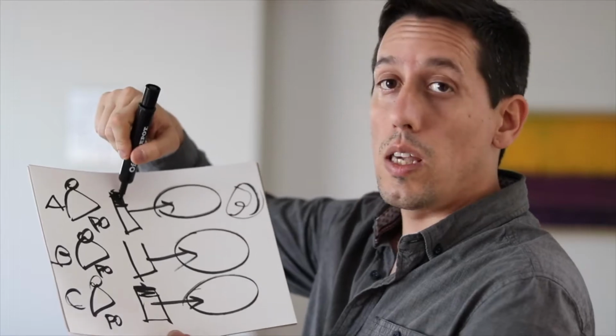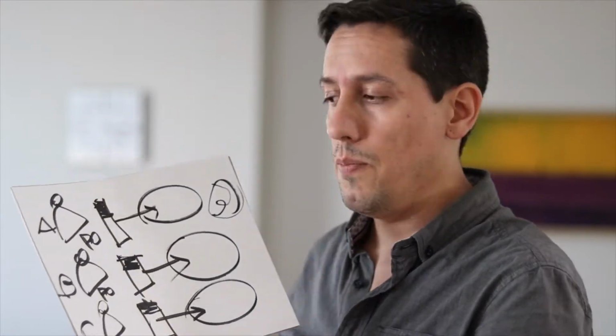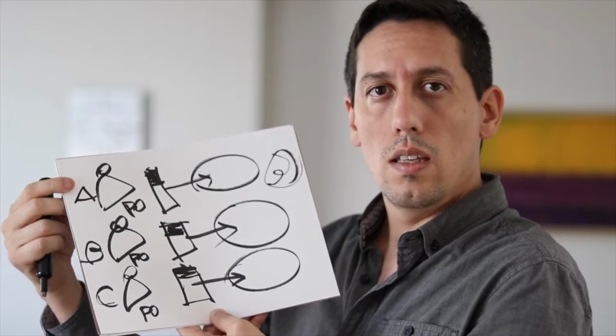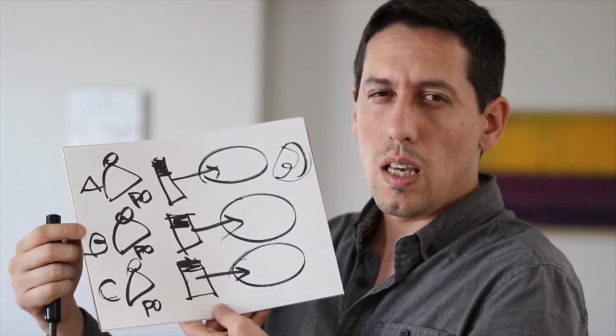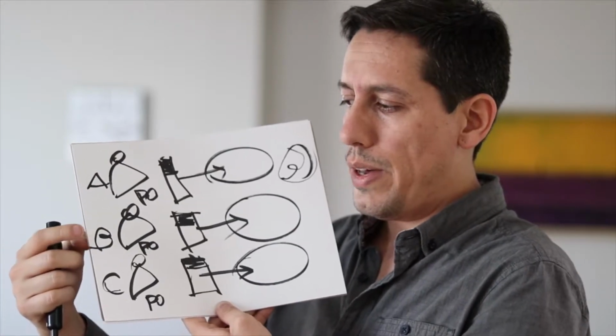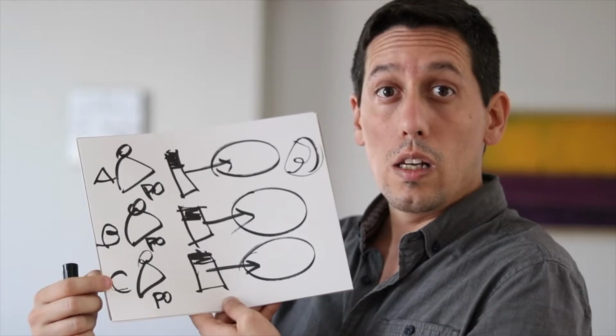And let's suppose that we have this team working in A, this team working in B, and this team working in C. We are not working on the most valuable things because only A is working on the most valuable things. Maybe B can be working on somehow valuable things, but C is working on a way less valuable product.